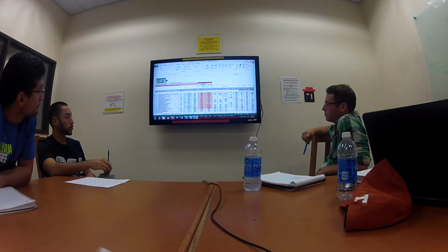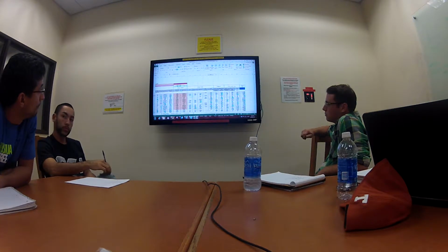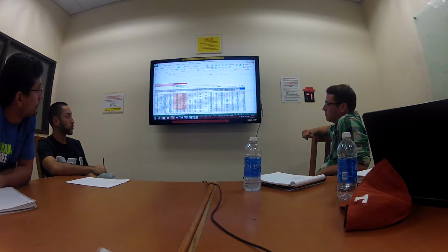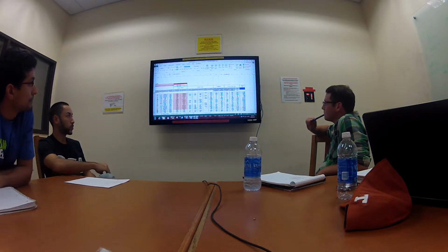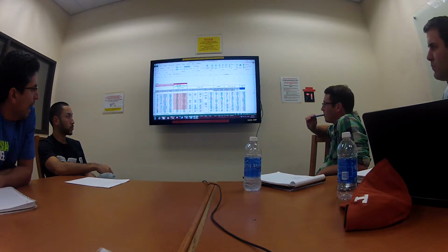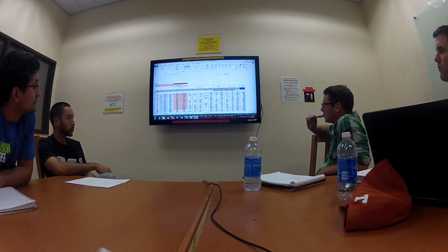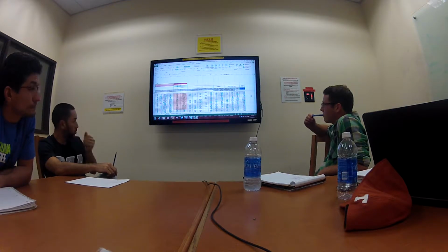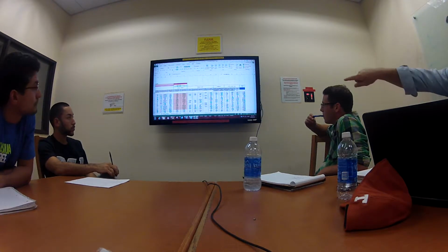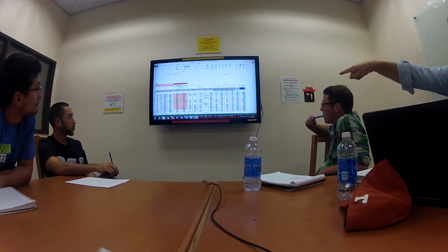So anyways, I spread indirects evenly, but I spread profit margin differently. You can see that 48% is the average markup for labor and equipment, and 22.6% is the average markup for materials and subs. But when you take those markups and add them together, it equals 35% total of the overall direct and indirect costs together. We go with labor and equipment first, just down to the 796.